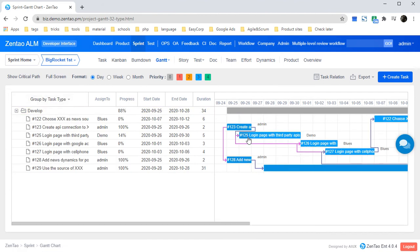You may also notice that in a bar, there is some dark color. It stands for the completed percentage for this task.